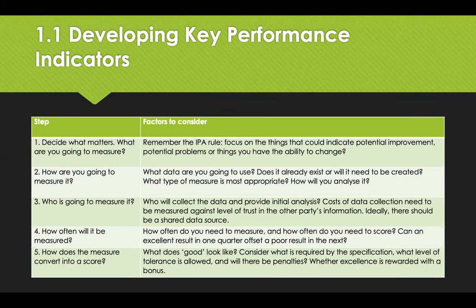And how does the measure convert into a score? What does good look like to you? Consider what is required by the spec, what level of tolerance is allowed, and will there be any penalties, as well as whether or not any excellence will be rewarded with a bonus.